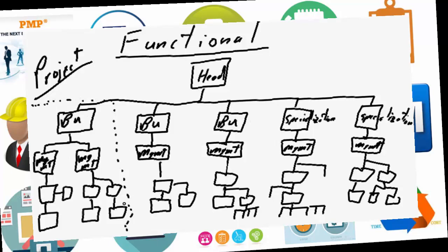Because we're operating in a functional area, the project itself is traditionally going to be limited to that particular business unit. Obviously, a project needs a project manager, so this line manager gets assigned project management responsibilities as well. And that's one of the key components to project delivery in a true functional environment: an existing manager takes on the responsibilities of project management.